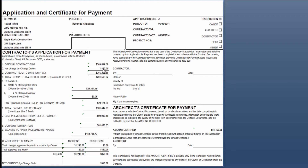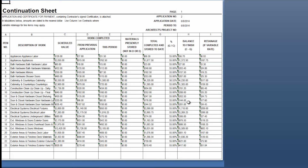You'll see here that our net change by change orders has now been updated to include that $1,200 change order and the $850 credit memo. The contract sum to date has been updated. Total completed and stored to date is the sum of all invoices that have been included on an application at this point. Retainage, total earned less retainage, and then it subtracts the previous certificate for payment to get the payment due, which is the sum of all of the invoices included on this application. You get your new balance to finish, the new summary of the additions and deductions and the net changes, and you can continue to the continuation sheet again.